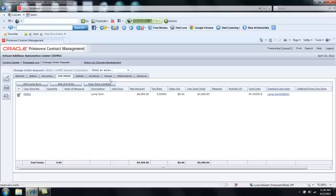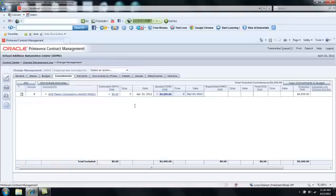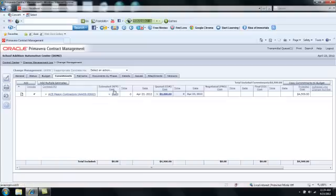Now I'm going to click the hyperlink to return to change management. So when I review Ace Mason's row on this Commitments tab, I'll see that we have in fact progressed from the estimated phase to the quoted phase, and a change order request document was created with $4,500 as the quote.